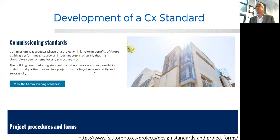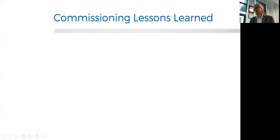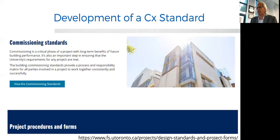The standards also form the basis of the tender and the agreement. We have a 10-year life cycle on typical large buildings. Of those buildings, we will probably be signing business documents in year 5. We change our standards, as do most companies, on an annual basis, and sometimes more often than that. So you can appreciate that when you're going out for a tender on a building that you tendered 4 years ago, the standards that you tendered to are the standards that project abides to.